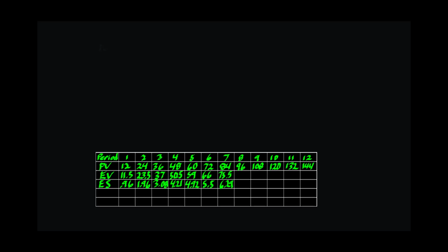Next, calculate the Schedule Performance Index for time, the SPIT. It's equal to the earned schedule divided by the actual time. So for us that's 0.96 divided by 1 for 0.96, and then we've got 1.96 divided by 2, and that's 0.98, and then 1.03, 1.05, 0.98, 0.92, and then it's 0.899. It's been rounded to just 0.90 here.